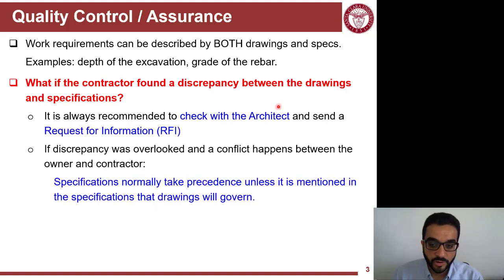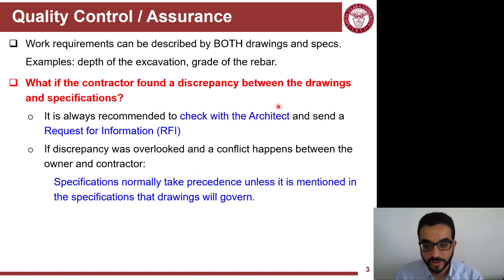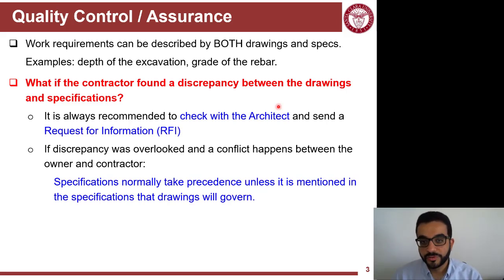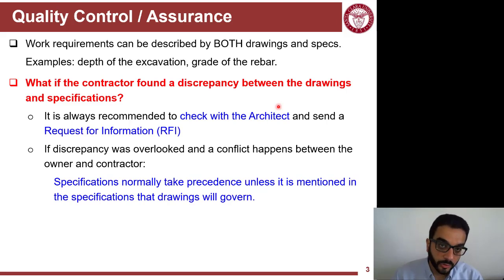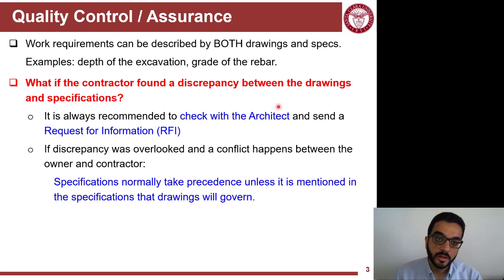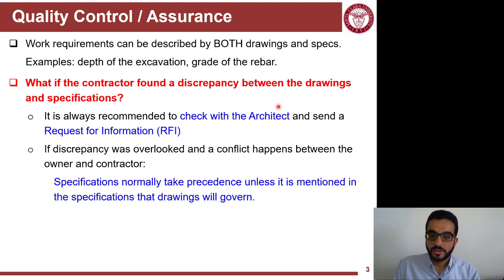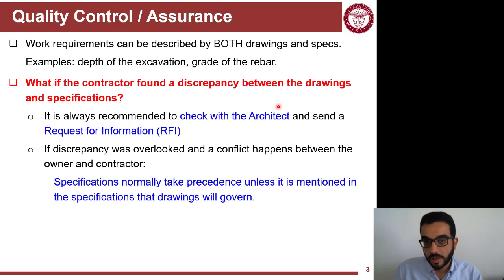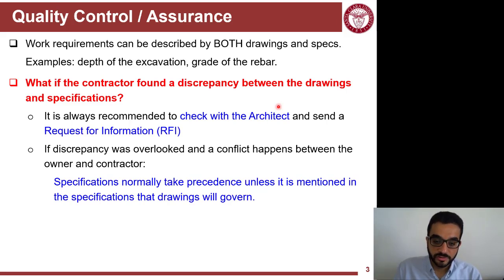From practice — in legal cases and court cases — specifications normally prevail over drawings, which is interesting because people put more effort into drawings and often copy specifications from project to project. But legally, specifications have the upper hand, unless you state in the specifications that in such conflicts, drawings will govern.